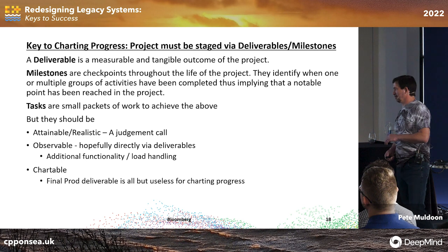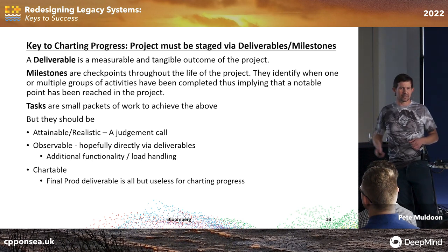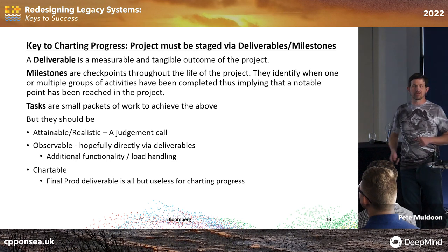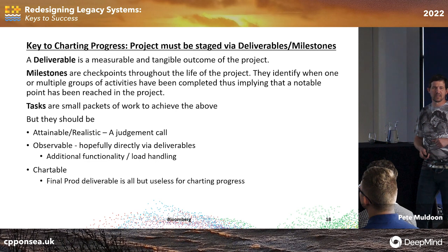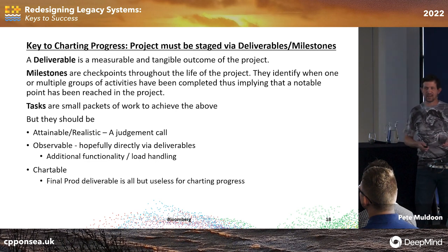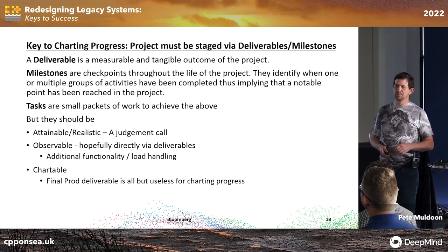And you should be charitable. By that, I mean you need a lot of these sticks in the sand, not just one at the end or one in the middle saying, this is the halfway project milestone, and that's the full way. It tells you nothing. And when you get to the end, you're likely not going to have a proper system.